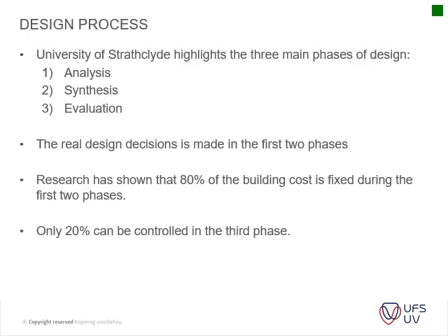Then your design process. Usually you have your analysis, your synthesis, and your evaluation. You've got your analysis of what the need is, you try and make it material, and then you evaluate it: will this actually fit within the budget. The real design decision is made in the first two phases of the project, and research has shown that 80% of the cost of the building is usually made up in these two phases. Only 20% can be controlled in the last third of the project.